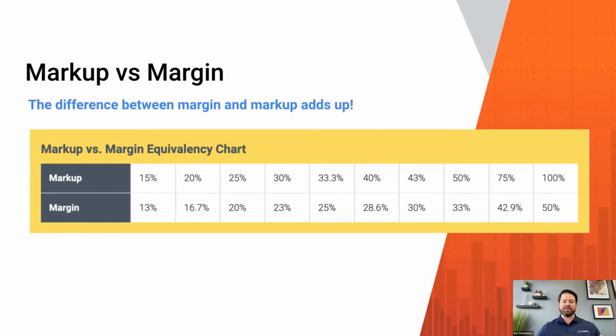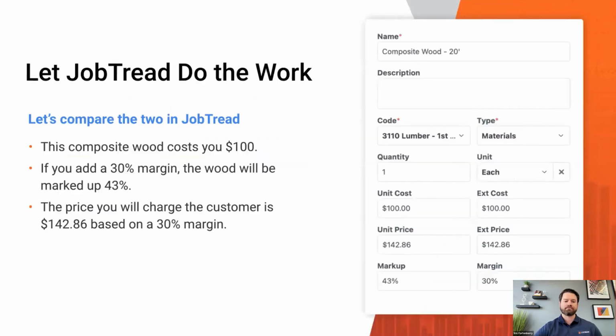Ultimately, you want to make sure that you're using the margin so that going into every single job you're going to hit your target profit margin, and that this job is going to be worth the effort. With markup, it's really almost totally irrelevant after you've sold that job, after you've priced it. The notion of markup never comes up again. In order to accurately price those jobs so that you can hit your target profit margin, you need to be using margin to calculate that price.